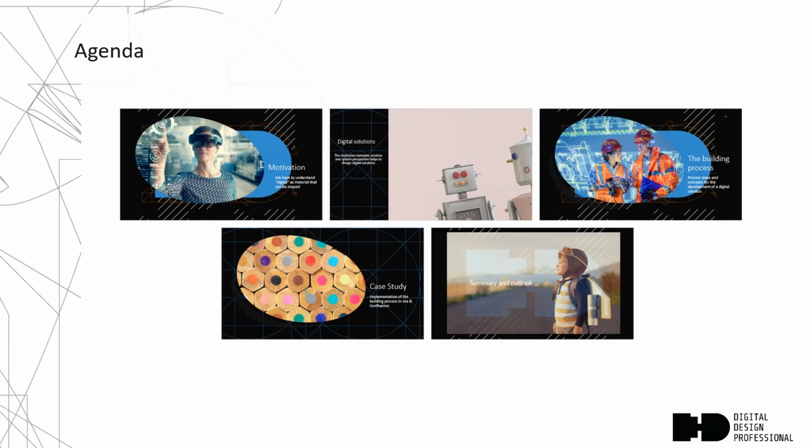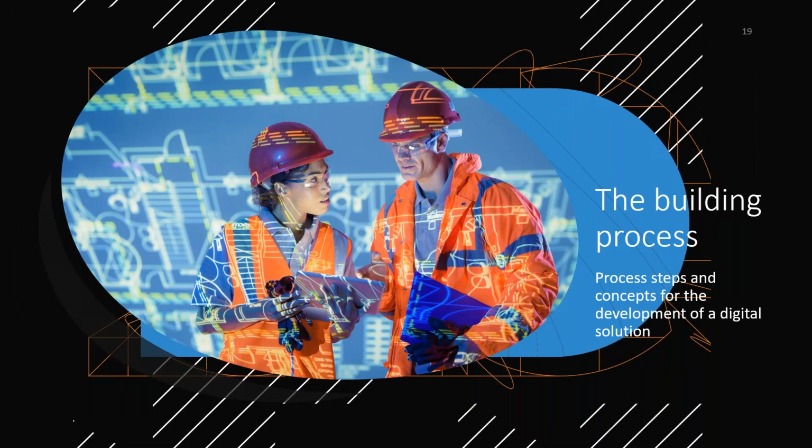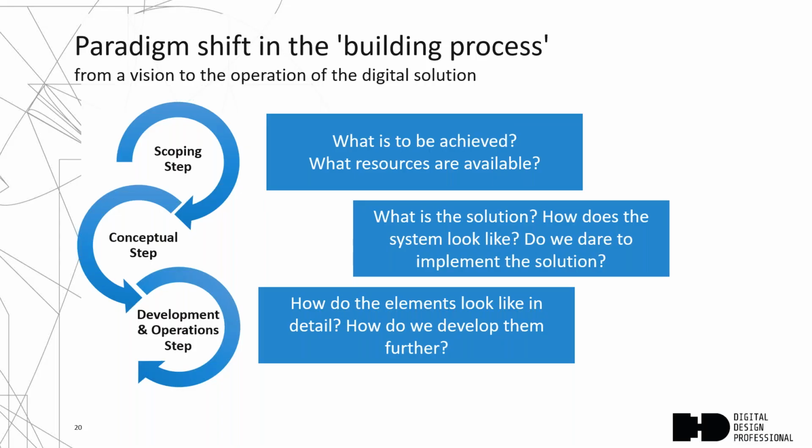So let's go into the details of the building process. I really love the word building process because it's so hands-on and you really describe that you create something that is really tangible. And I really believe that digital solutions are tangible as well. When we talk about the building process, we really start with a kind of scoping step where you clarify what you want to achieve with your client, with your sponsors, and you especially clarify the amount of resources, in terms of money or personnel or whatever you have, that is available for building your solution.